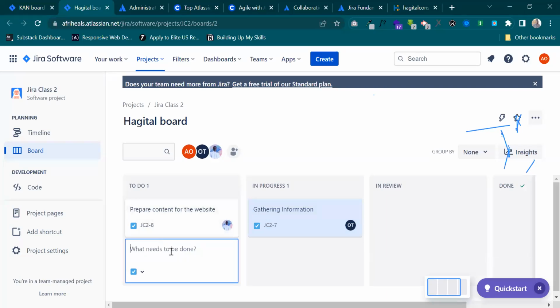Now, the reason why the next task, which is preparing the content of the website, had to wait is mainly because the content writer needs some of the information from the company before they can proceed. So now, there are some other tasks that I could put on that could start working. It can be tasks like to determine the number of,